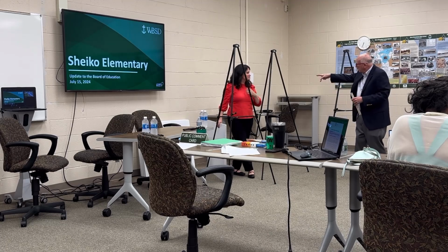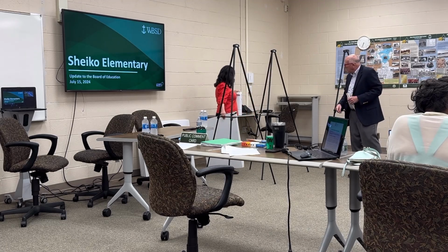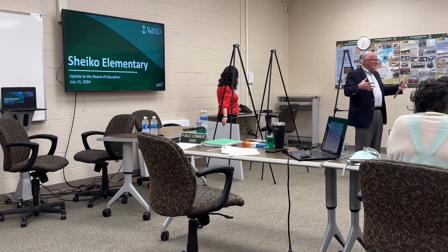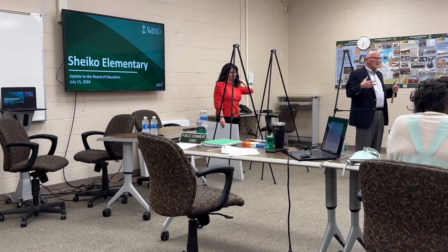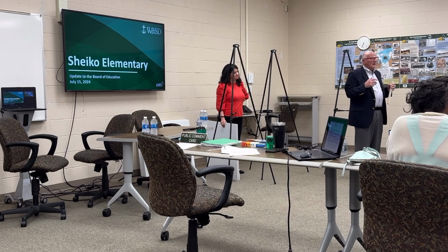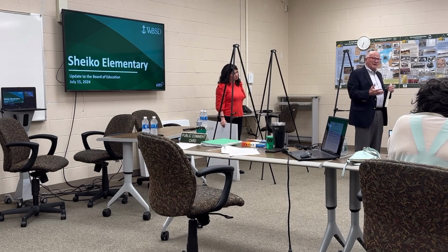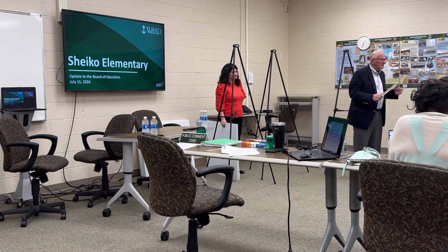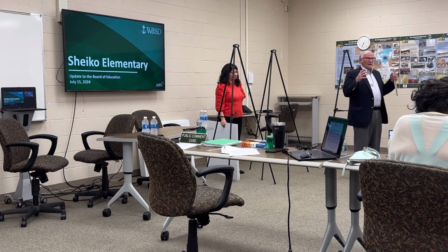Those are at half scale, but lots of different drawings are presented along with specifications. The construction manager is presently putting pricing to that area to make sure that we're still on track with where we need to be to keep things on budget.